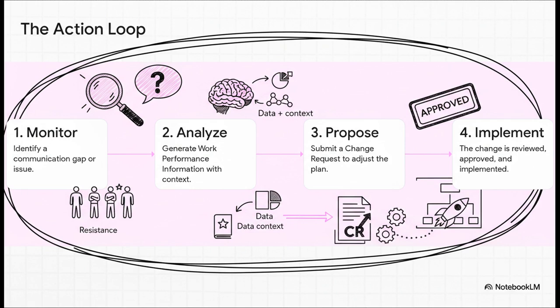So what does that actually look like? Well, it could be a formal proposal to kill the weekly email update for that stakeholder and replace it with a biweekly 15-minute sync meeting, because your data shows the emails are just being ignored. It's a specific, data-backed proposal that then goes through the formal change control process to get approved and implemented. This is how you systematically fix these problems.